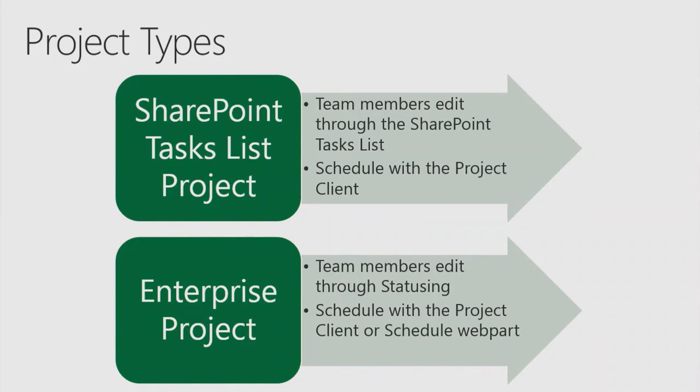For those, we added a new project type called SharePoint Task List Projects. Yes, a long name, but it basically is what it is. It's a SharePoint task list that is connected to Project Server, so the data comes in, and I'll show all this. But the big things to remember with this are team members can edit this through the SharePoint task list. Basically, anybody you share this project site with will have edit permissions to it, so you don't have the control over it as a project manager is used to having, but you probably don't want the control over this.